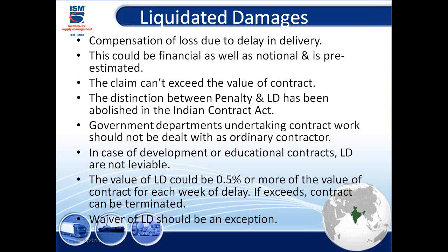Financially, if I delay by 2 weeks to 3 weeks, I have to deliver the goods. My assembly line may get stopped. My production line may get disrupted. And even if it is not disrupted, a further delay from my side could change my image, my brand. So notionally also I could ask for the claims around.